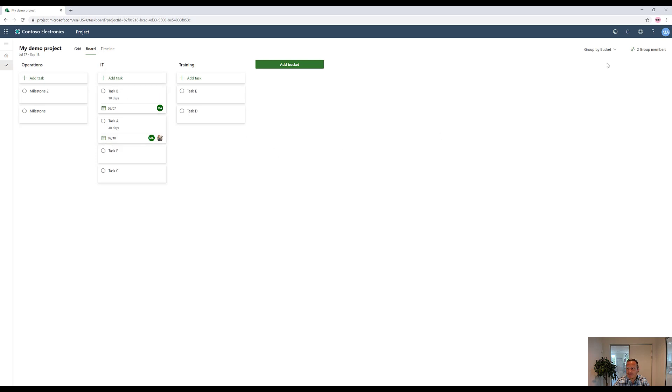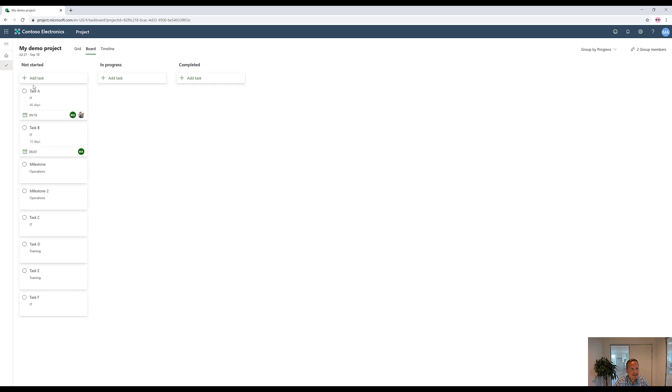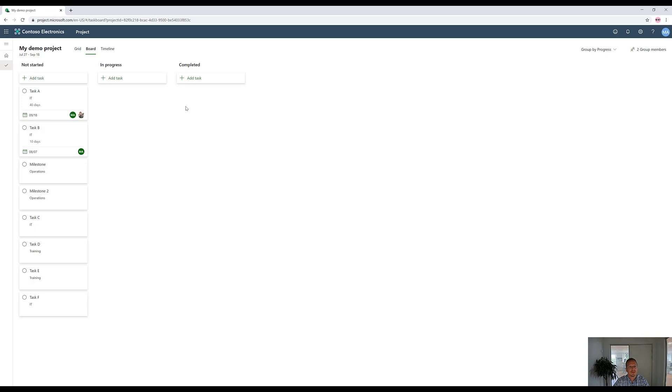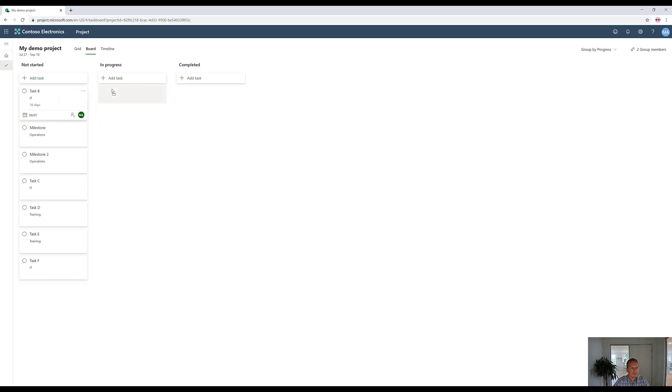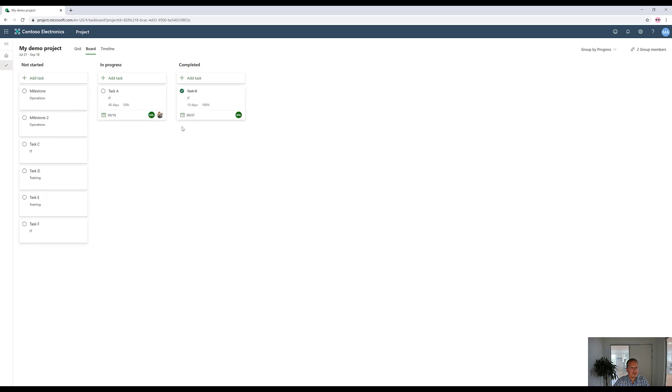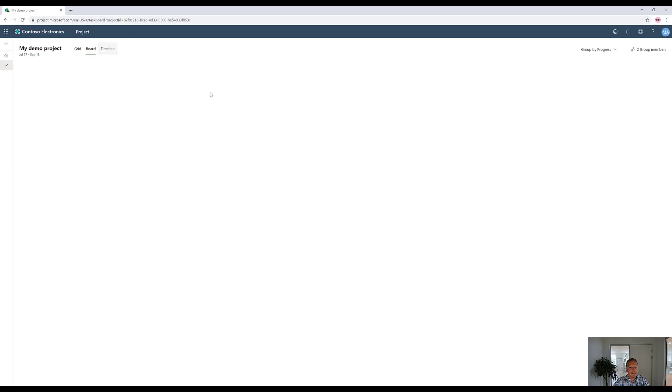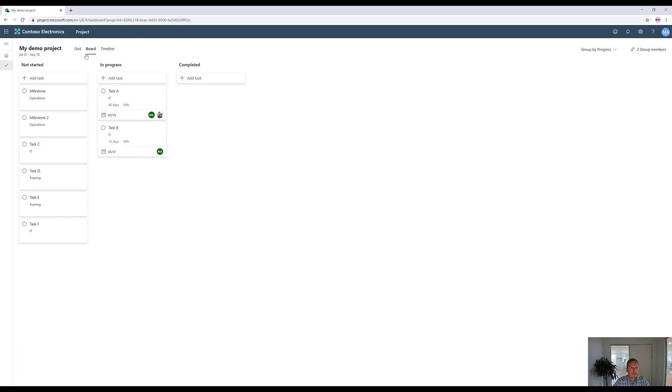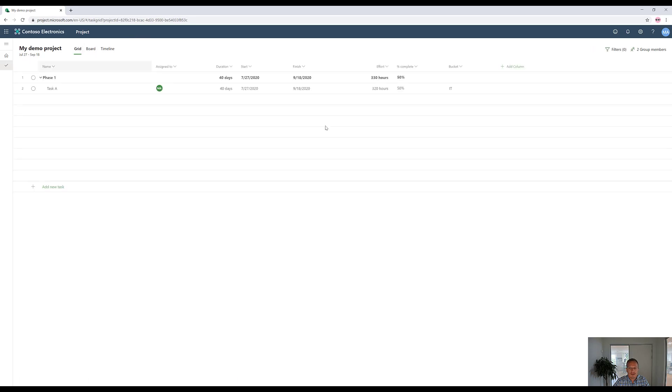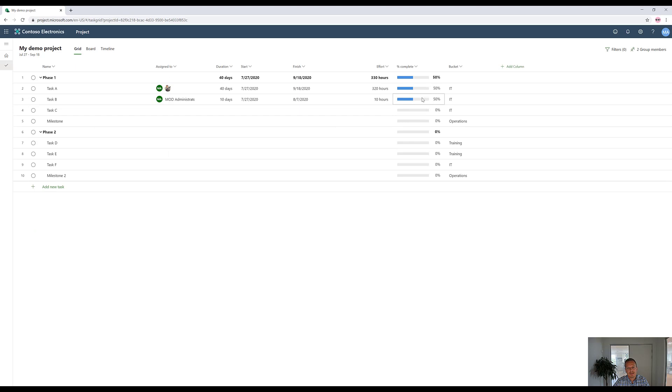Besides that, we can change the view to progress and simply drag and drop. You cannot change from not started, which equals 0% complete, to in progress, which equals 50% complete, all the way through to completed, which is 100% complete. So if we take task A and put it in progress, and task B has completed, you will see that if we go back to the grid again, that you can now see that 50%, 100% being shown here and also rolled up to the phase level, which is now 60% done.